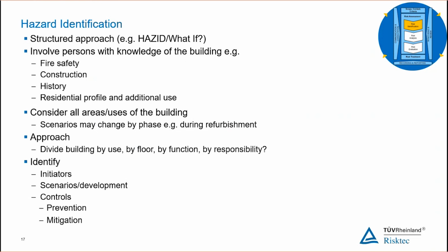So to involve people with knowledge about the operational history of the building, the construction of the building, the history of the building, the way it's operated, the systems within it, how we continue to maintain it at that point. Don't get carried away. There's no point in having hundreds and hundreds of people in the room. There's no point having, typically, 6, 8, 10 people involved. This is a good starting point.